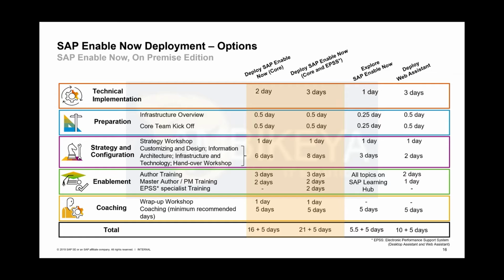Yeah, that's the point where we have to be a bit more strict in regards to expectation management. Yeah, I absolutely agree with you. And there we will have the listings, and that's a pre-sales discussion. So this is what we want to force pre-sales to do, saying, okay, if you only want to spend this amount of days, this is what you get, and this is what you definitely don't get. So we have exclude lists in there.